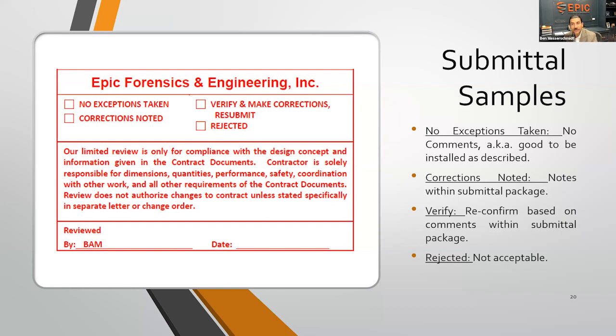The equal is the most important part here. So there may be scenarios where they go back and forth multiple times, and the submittal log will also be kept up in the same manner as the RFI log and the change order log. So it may take a couple of iterations before the contractor actually gets things right.